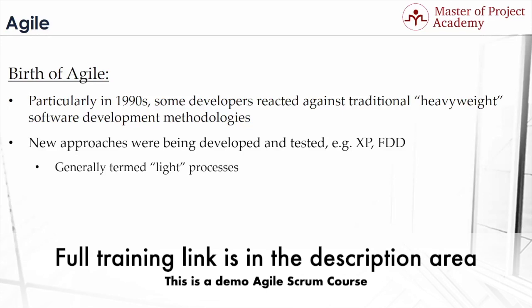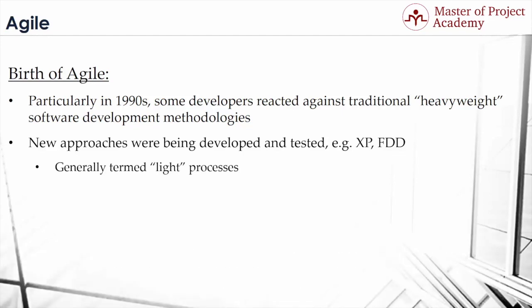So briefly, instead of heavy analysis phase, software development is done based on deliverable features to the customer in feature-driven development, and as soon as a meaningful feature is ready, it is presented for the test of customer to get the feedbacks and plan the remaining features respectively.